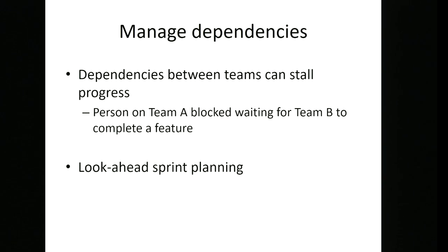So examples of things that might actually cause problems, in terms of the dependencies, are not catching interfaces which might be required, and also the interfaces which you don't know you're going to have initially, unintended interfaces, shall we say, and then they suddenly appear somewhere in the process.